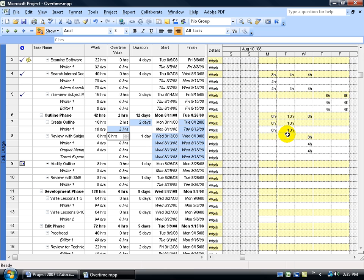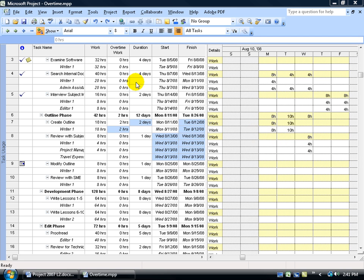You could say why can't I have one hour on Monday and one hour on Tuesday? Well, as far as project schedule and budget calculations are concerned, it doesn't matter when the overtime hours are worked, only that they are worked.